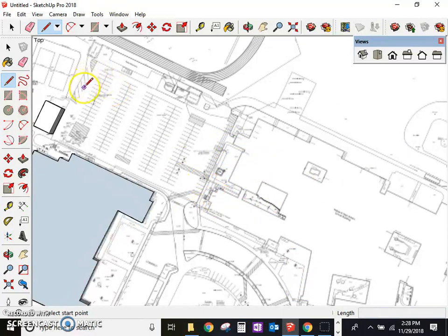So we're going to give them some material laydown somewhere out here, equipment storage. We need to keep access to these loading docks. Both of those loading docks need access to them. When we're building this addition, we're going to have to pick stuff and put it into this building over here, into that courtyard. So we're going to need to show some equipment. All right, let me